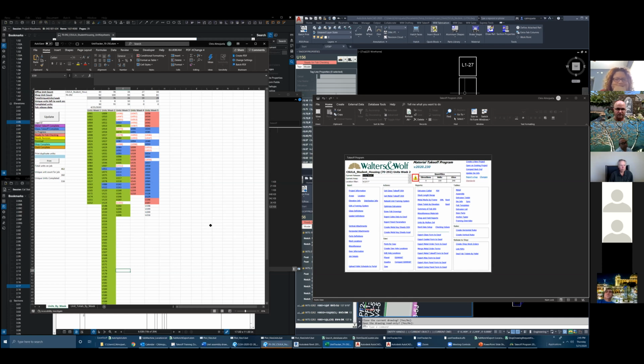Okay. Yeah, it makes sense. So you tackle the hard stuff first because you might need more information and you can't have that happen during the week where you're trying to get it released, right? Right. Because if we start to run out of time, we would ask for more resources, and it is usually easier to give those resources the easier units. You don't want to give them all the hard stuff at the end, because now everybody's gonna get stuck at each of those difficult units that's due like 2 days from the day you give it to them.